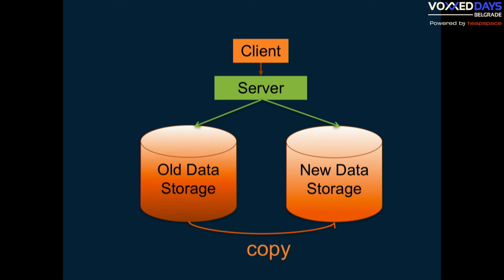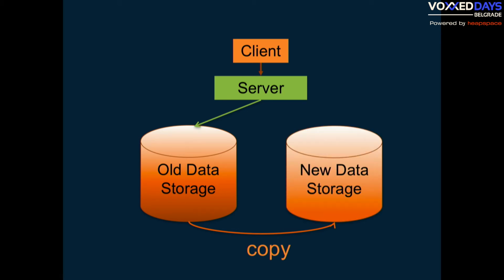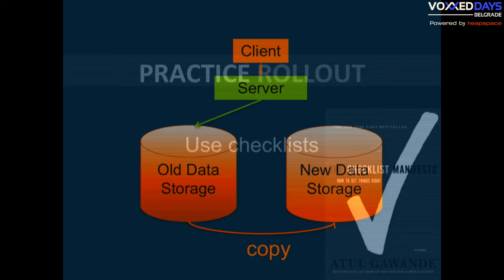And in the case of data migrations, you might find that something becomes corrupted, so you stop serving the request from the new storage system, and if there's not that much data to begin with, maybe you just scrap it altogether, and then you say, okay, I'll try again, and then you start trying the migration again. Maybe you'll fix the corruptions because you've spent some time understanding how it could get corrupted, in which case you won't have to scrap your database and start from scratch. But understanding what the rollback looks like if something goes wrong that we didn't anticipate is really important.